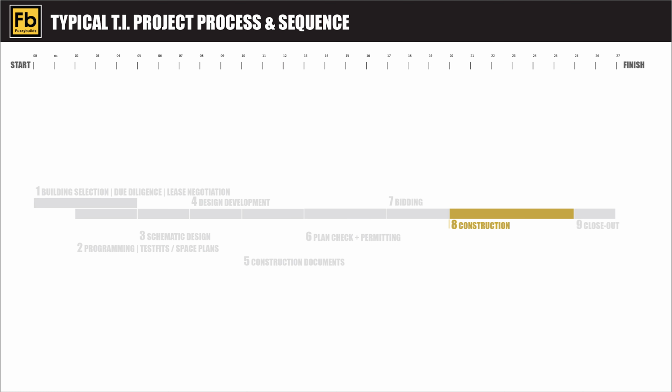During this phase, going back and changing anything has a substantial impact on both the schedule and the cost, because you may have to take a few steps backwards. A change will require a redesign, plan check, and pricing before you can start construction. So depending on the extent of the mid-construction changes, you'll need to go back and add in additional time needed to design, plan check, and price to the overall construction schedule.